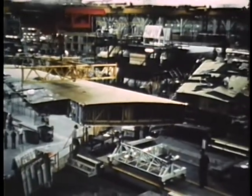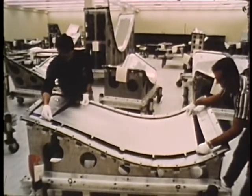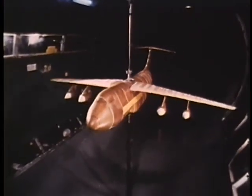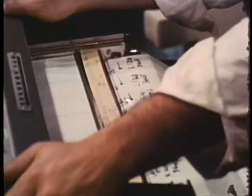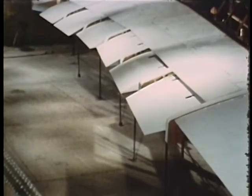The Avco outer wing sections must mate exactly with wing tips, leading edges, and ailerons manufactured by Canadair Limited in Montreal. We're doing nicely, but I must admit it's only due to the extreme cooperation. You see, we started out with a high lift system. Then, rather late in the game, but as a result of continuing wind tunnel testing, Lockheed engineers found they were becoming critical on the three-engine climb out. They wanted to trade off some lift capability for some freedom from drag to improve that climb rate. So they shifted to a Fowler flap system, which also changed the slat design. To accommodate a design change this important, this late, and still meet schedule, puts the heat on. And it takes good cooperation all round, as well as good management by primes and subs.